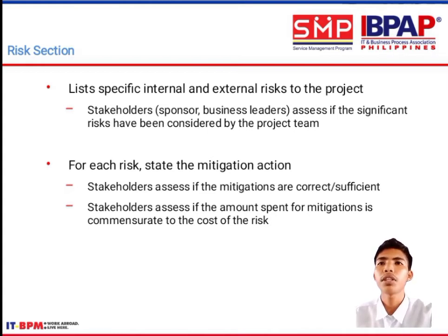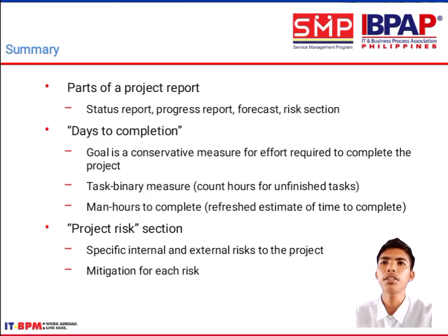For each risk, state the mitigation action. The stakeholder assesses if the mitigations are correct or sufficient, and if the amount spent for mitigation is commensurate to the cost of the risk. Mitigation refers to the measures taken to lessen the harmful effect of, or manage the harmful effects if, a risk occurs.